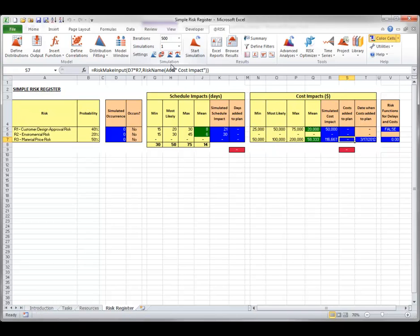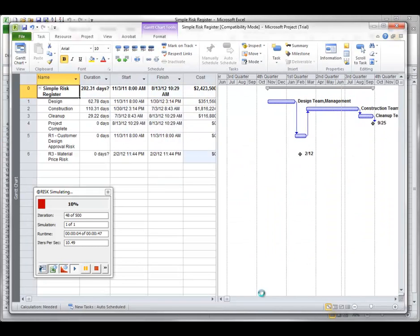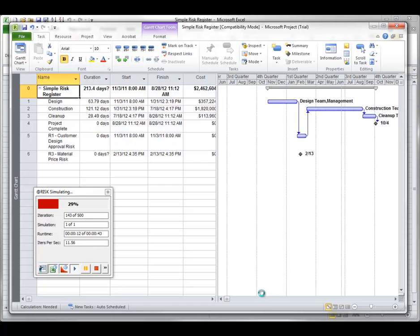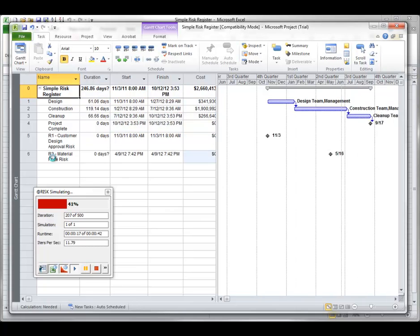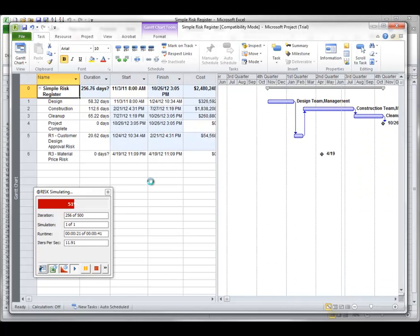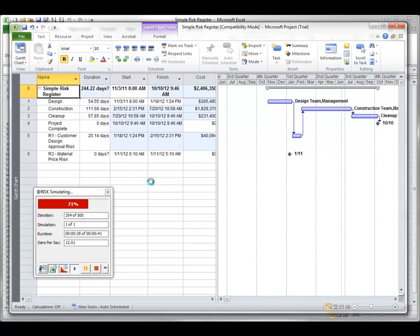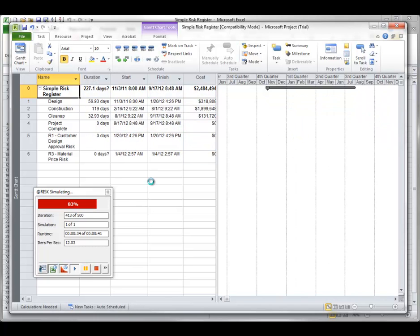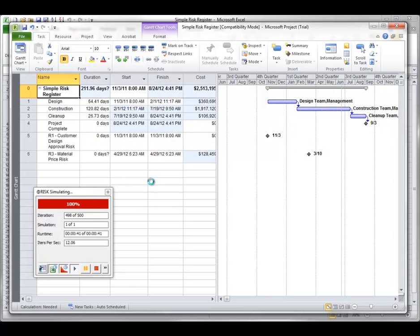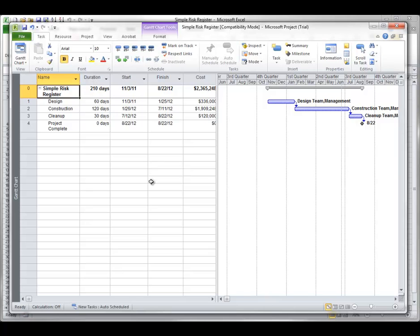Now I will run a simulation, and as it runs I will open the Microsoft Project window. Two new entries have been added — one for customer design approval risk and one for material price risk. When the customer design approval risk occurs, a new task bar appears in the schedule with the design task as its predecessor; its length changes depending on the size of the schedule impact. The bar enters and leaves the schedule depending on whether the risk occurs. When the material price risk occurs, a black diamond is displayed at the date the cost is introduced to the project, and this cost is added to the project's cost calculations.